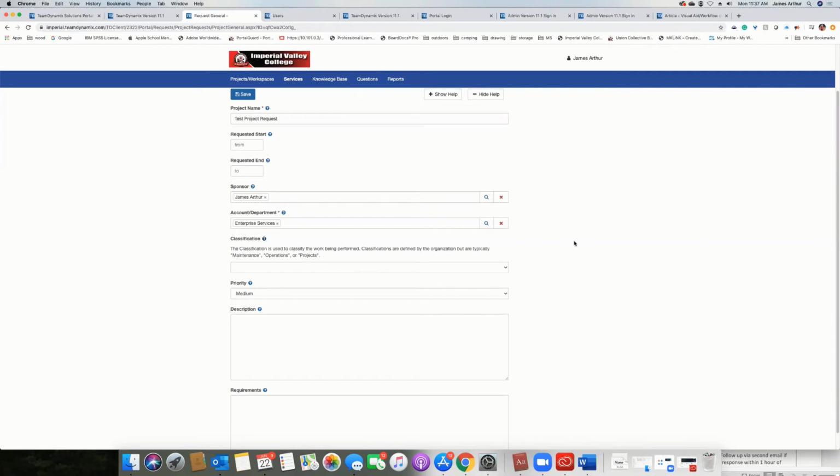All right. The next field down is the priority, which again actually is a mandatory field, even though it's not shown here, because you can hide it from your requester. And why would you want to hide the priority from your project requester? Because everything's a high priority if you ask them. Yep. That's exactly right. So you can hide the priority from them, but still make it part of the request in the back end so that the PMO, somebody reviewing the request, can get a more accurate reflection of what type of priority this is, and then set it appropriately internally so that it's a medium versus they think it's a high, right?